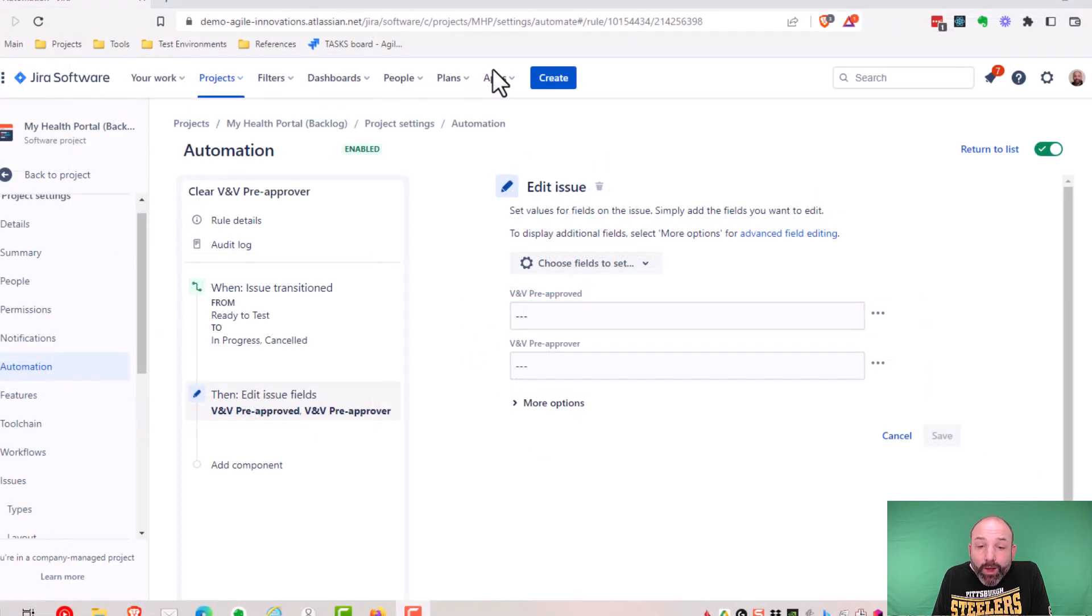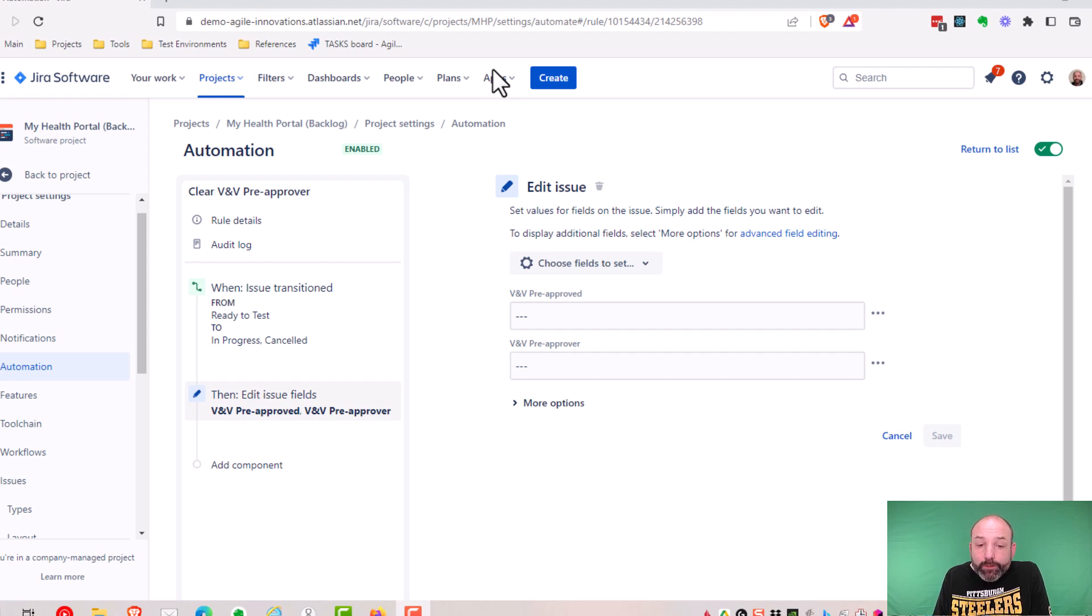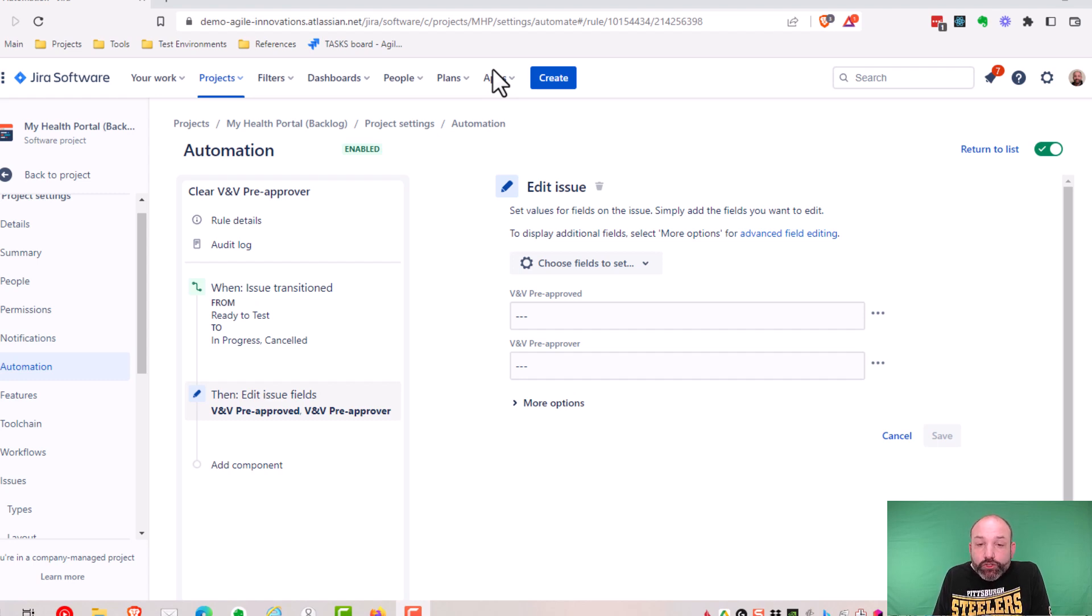You might be asking why I don't just blank these fields. Why am I setting them to these dashed lines? And the answer is because of a longstanding limitation in JIRA. If you recall, these fields are of the type text field read-only. And JIRA does not allow you to set a read-only field to a blank or null value. You have to set it to some text.